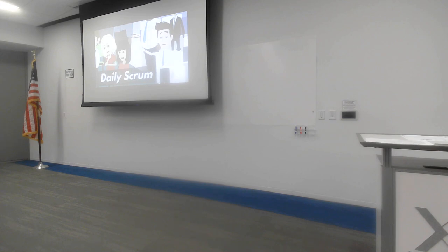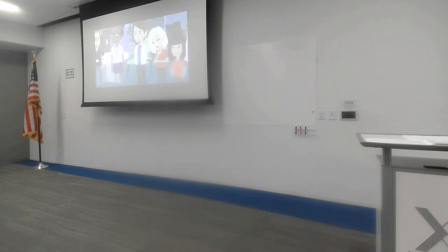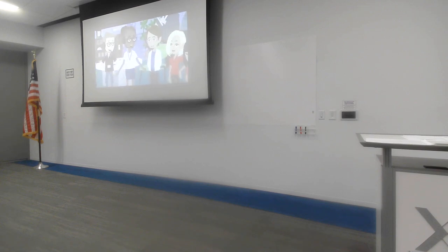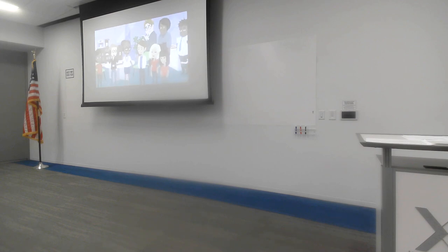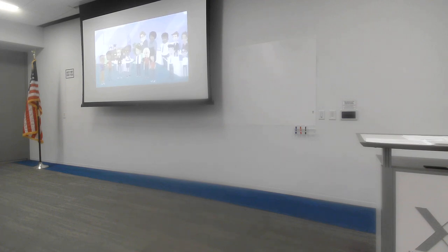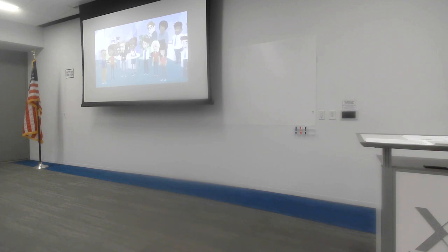Now, let's look at the daily scrum. This is a daily 15-minute time-boxed meeting for the team to coordinate their work toward achieving the sprint goal. This is often called the daily stand-up, as many teams have found standing helps achieve the time box of 15 minutes, keep everyone from falling asleep, and off their phones and computers. Some teams go around and have each person say what they did yesterday, what they plan to do today, and if they have any impediments.